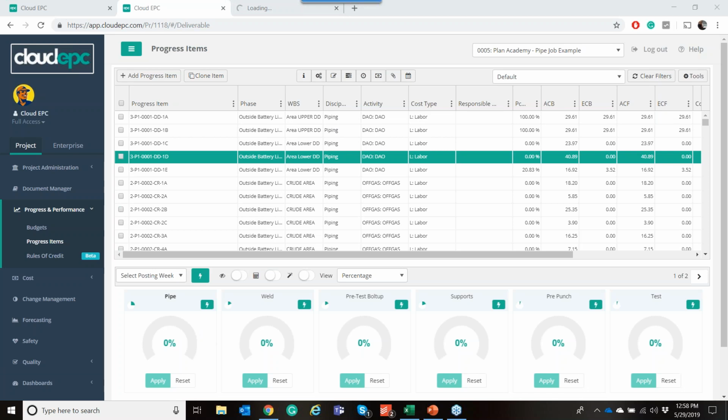What it does is let you collect input through Excel for whatever reason. We see this functionality used quite a bit for subcontractor input. As much as I would love to have everyone in our system, there are still lots of teams a little uncomfortable with that. So they'll create a subset of data, export it, email that Excel file to a subcontractor to put in their input, go through the process of validating through Excel, and then re-import that data back in, and it'll do that update.